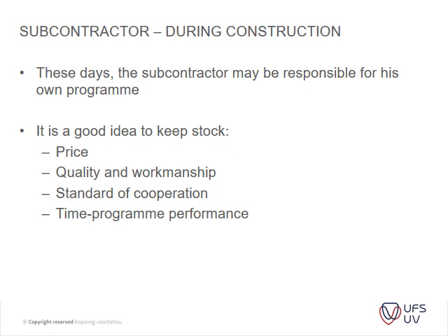Then it's a good idea to keep track of the price, quality, and workmanship standards and incorporate the time program performance of subcontractors. I've seen guys who have vendors and subcontractors actually keep a scorecard and a rating on them, so the guys can move up and down, and that's usually very confidential information.